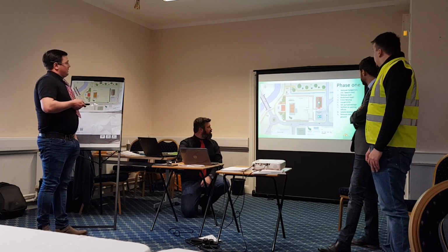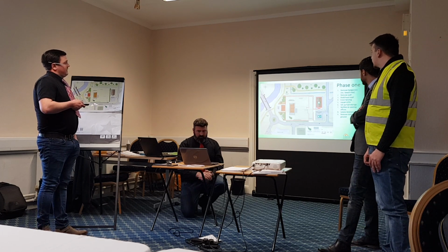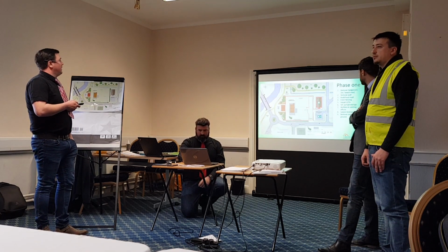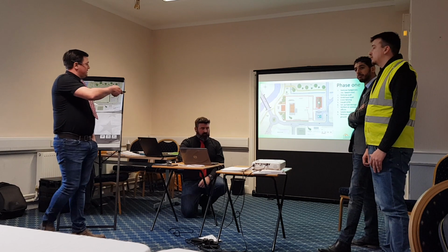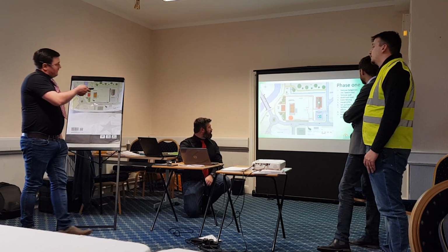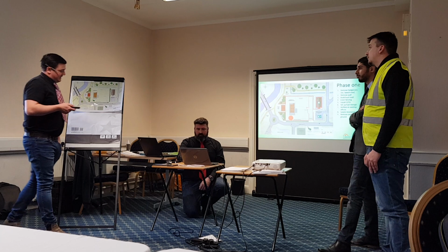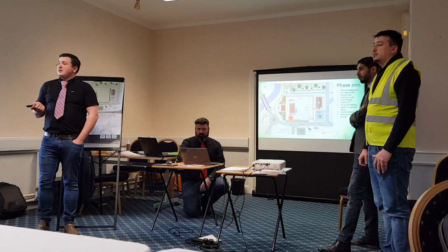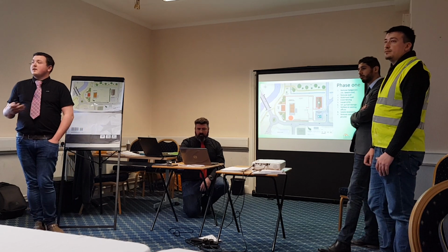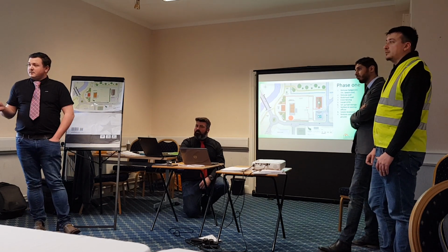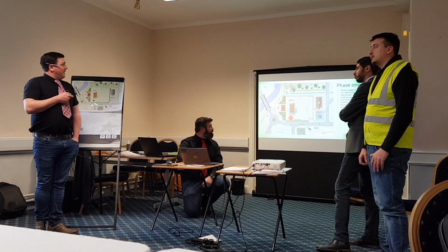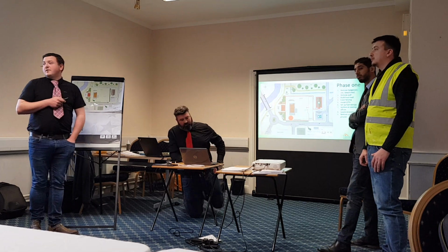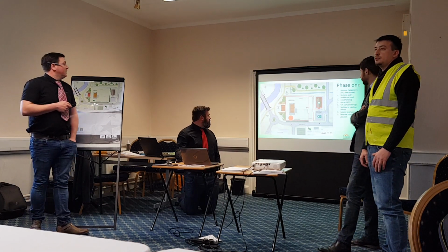We're also for security, we're going to have a reception here with fingerprint scanners, so people coming in and out have to come through this entrance. We have Japanese knotweed down here in the corner. This is going to be completely isolated. Because Japanese knotweed is an invasive species, we don't want anyone coming into contact with it through tools, boots, walking, clothes, because that can then spread the knotweed all over the site. So this area will be isolated off from everybody else, and we'll be getting a specialist company in to advise on what we need to do with that in the future.